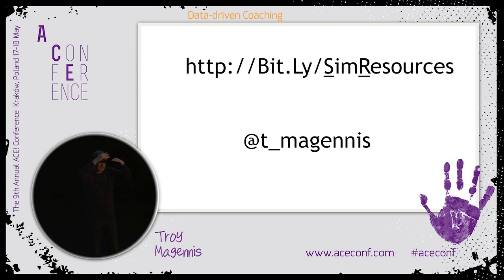What you're going to have happen there is you're going to lose the ability to know how quality is going to be. So the measure which I got them to convert it to, of course, was just the ratio of the amount of planned work versus defects and challenge the team to keep that stable. So the quality metric,